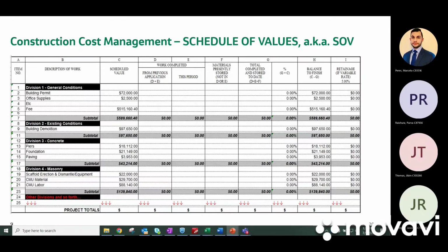The general contractor will try to give you a schedule of values with very few details. Some general contractors actually think it's a benefit for them if the owner doesn't know everything he's billing for. But that's not true. They're only hurting themselves by not having a well broken down schedule of values. For both the owner and the GC, I think the main disadvantage of a less detailed schedule of values is that it provides less factual basis for you to determine the value of the work performed that month.